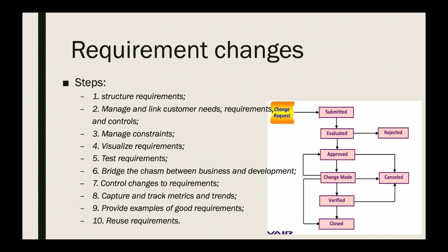So, when evaluating changes, several factors could be taken into consideration. Do the changes conflict with existing requirements? How will those changes affect the design, code, and components of the current project? What kind of impact will those changes have in the aspects of user interface, database, or reports? Will changes also affect other systems, libraries, or hardware?